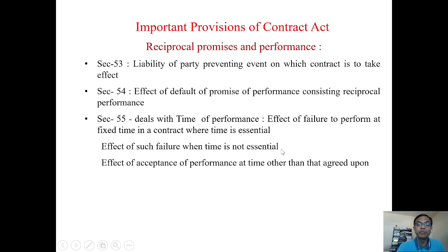There is a good judgment in the Construction Company and State of Maharashtra, AIR 1979. You can just refer to this. It deals with this topic, whether time is essential. Generally, in construction contracts where there are LD provisions or, say, extension of time provisions, time is generally not regarded as of the essence. Just in a legal sense, I am telling it. Otherwise, time as essence or not can be made subsequently by suitable communications.